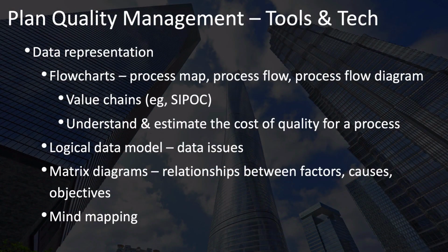You'll also need to use decision-making to decide on the right balance of quality activities to yield the best return on your investment in quality. And finally, you have test and inspection planning, because you should decide ahead of time what you will test or inspect, when, and how.